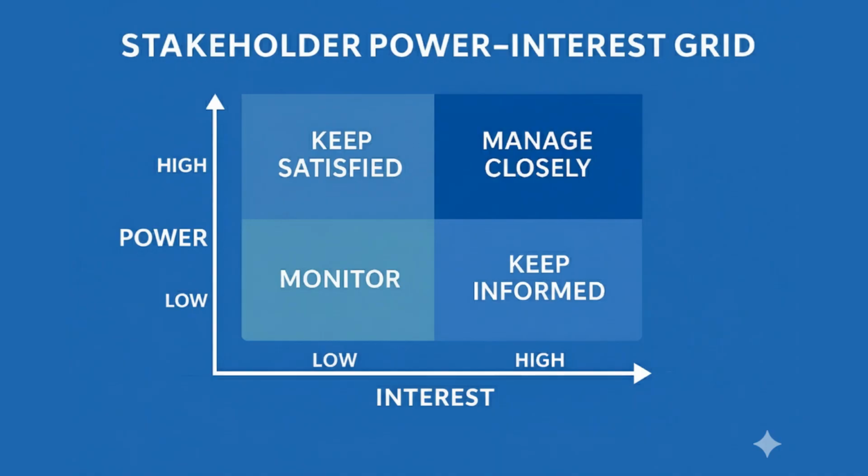This particular tool is used in the stakeholder analysis process, where you identify stakeholders as part of initiation and then you're going to plan the stakeholder engagement as part of planning. This will feed into the stakeholder register and the stakeholder engagement plan from a PMBOK perspective. This tool is going to be very useful for the project manager, as the project manager needs to prioritize limited time and resources on the stakeholders that matter most. You need to devote your time and resources to the most essential stakeholders. You're going to ensure that principles like value delivery and stakeholder satisfaction are always met.